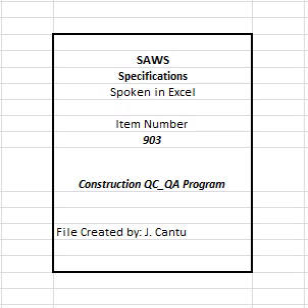903.3 Quality control. The primary function of quality control, QC, is to establish standards of quality for construction. The contractor's plan defines procedures to manage and control his/her own activities, all subcontractors' activities, and all suppliers' activities, ensuring the completed project conforms to the intent of the contract documents. The contractor's QC plan is the foundation for quality work. It outlines the planned quality control procedures, and is vital to the SAWS construction QC/QA program.